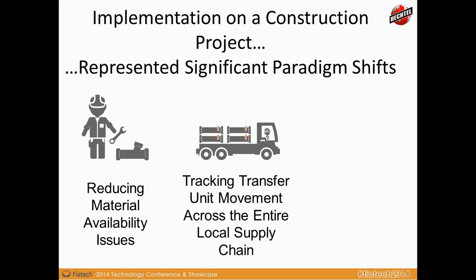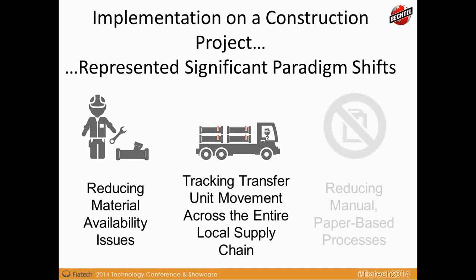We've mobilized the crew to fit pipe, and yet from a materials requisition perspective, we've got lag, because even though the withdrawal request has been made, we don't actually know or can't find the material. Then add that into the context that you saw on Curtis Island, where there are only certain times of the day that the barges can operate, and the last thing you want to be doing is looking for material and missing shipping times while you've got a mobilized crew. And then on the next one, please, Stuart.